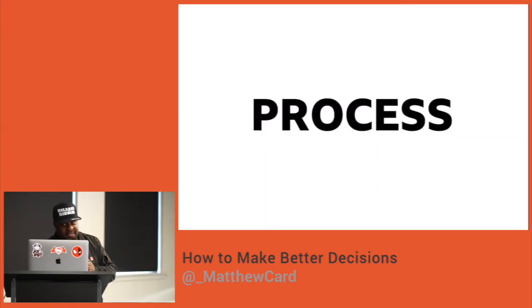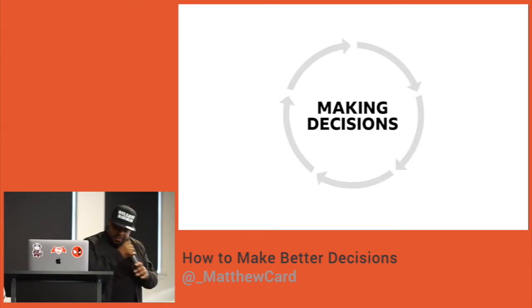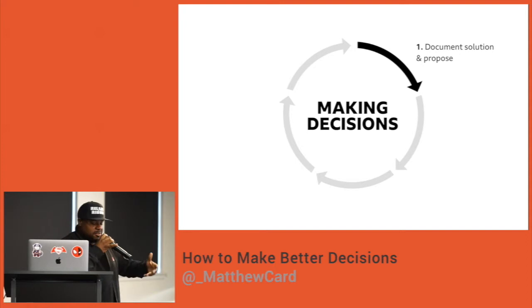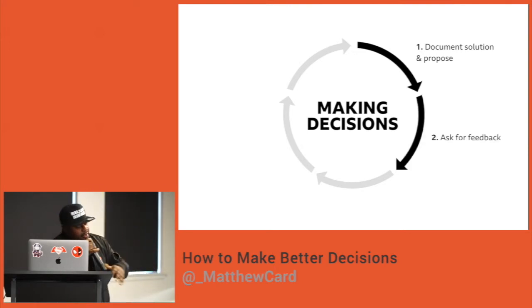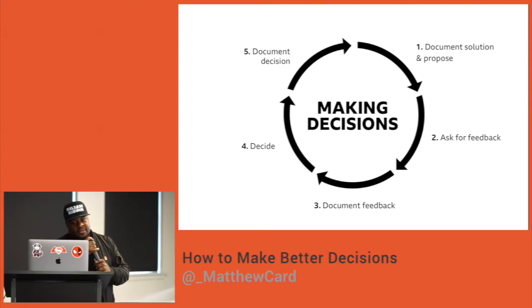So here's the process. It's really, really simple. When you have a problem or a task, document your solution. Come up with a solution with your know-how, with your knowledge. Document the solution somewhere like Jira or wherever you put your documentation, and then just ask for some feedback. You're engaging your team early and often. Ask for some feedback, understand the feedback, then document that feedback. Decide as a team how to move forward. Document the decision and the reasons why, and then move forward.